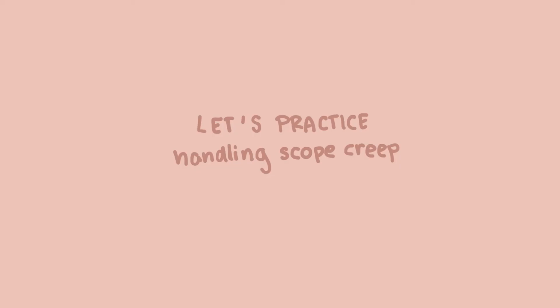Now you're giving them the decision. Is this thing that I want worth paying extra money for? Is this worth the impact to the timeline of the project? So I always give the client the extra price and any timeline adjustments needed to incorporate this new request. It's my favorite thing ever. I highly recommend doing this when scope creep happens.